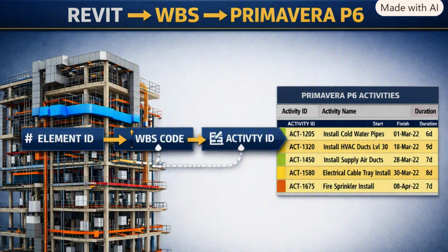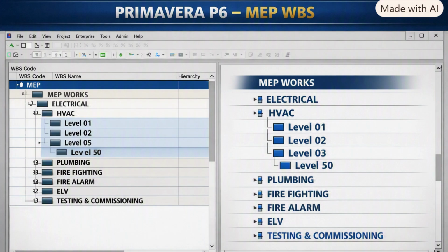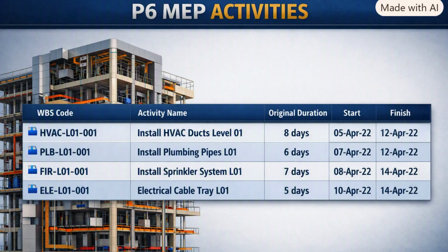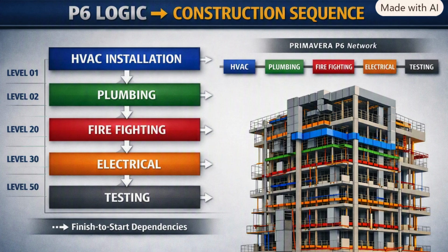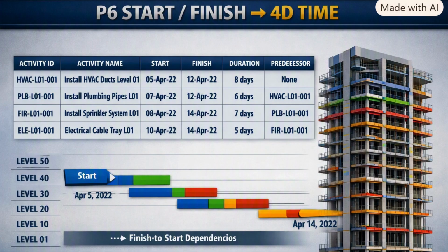Every relevant model element should provide information that can eventually be connected to a continuous schedule. The beam element should not remain isolated from planning information. We need a consistent method of identifying the element, its work package, and the primary activity responsible for its planning. The purpose is to create a consistent information structure that can be used during model coordination, scheduling, and BIM